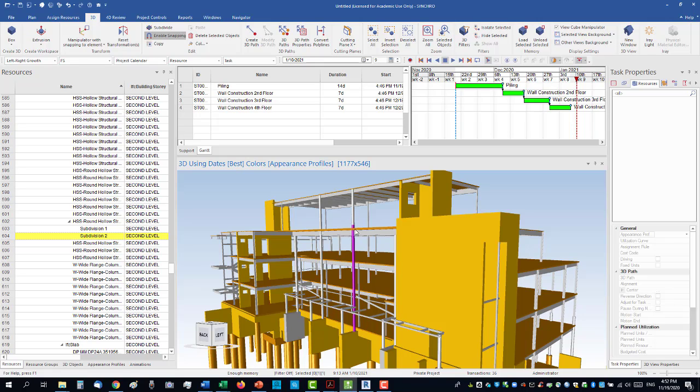This is the second installation of the column, and the first installation of the column will be this. Typically it depends on the project, but you can have 2-story segments, or in some cases 3-story segments. That will be a little long.